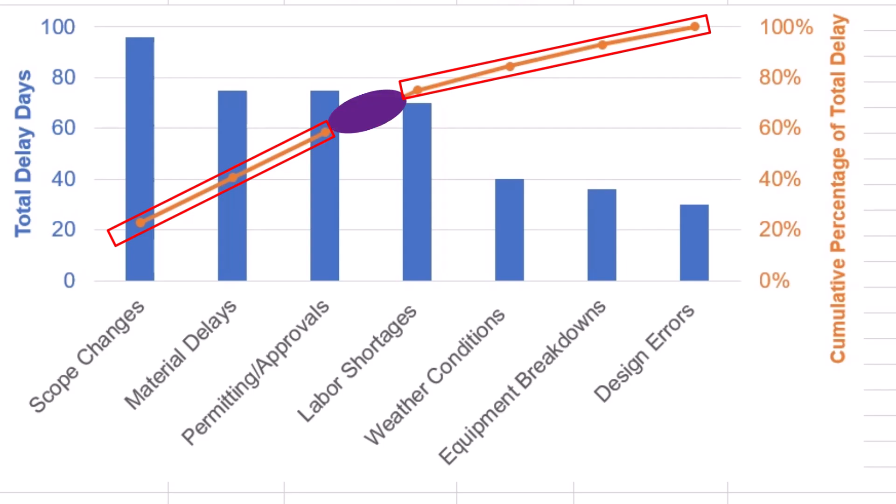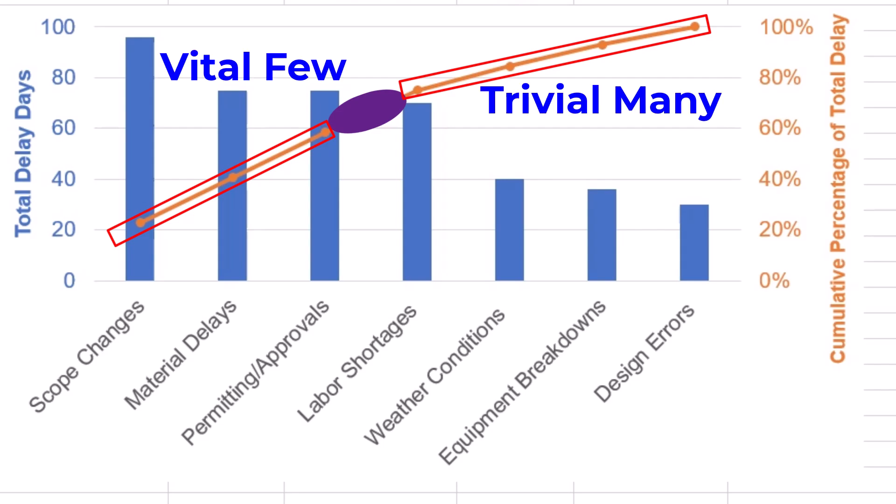You can also visually identify the knee of the curve — the point where the cumulative percentage line starts to flatten out. This roughly separates the vital few from the trivial many. Everything to the left of the knee is your high-impact zone where you must focus. This Pareto analysis is a powerful prioritization tool that tells us where to focus our efforts for maximum impact.